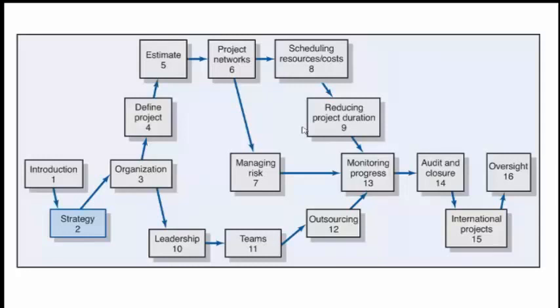Basically, critical path is you don't have any slack time. If somebody is working in a critical path, they cannot afford to delay even 1 hour or 2 hours, because if you delay in a critical path, the entire project gets delayed. So normally you put your good resources in the critical path so that the project doesn't get disturbed.